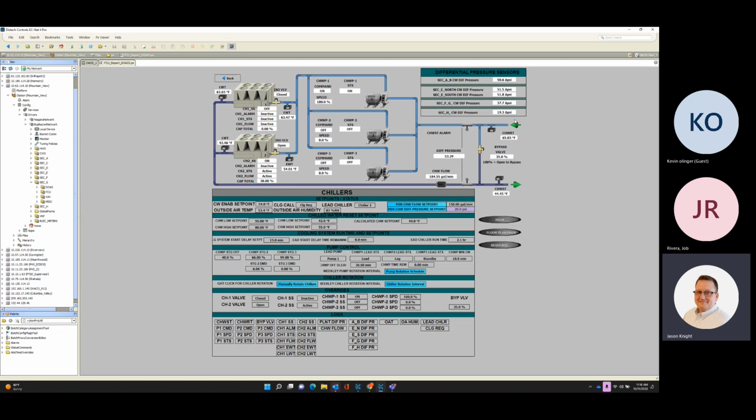So with that being said, we still have a lot going on. Commissioning has already started, and they're going through a bunch of stuff. And then they're asking for things that we weren't asked to do in the project scope. So we're trying to get aligned with SCC and then the project engineer and try to customize the stuff for what they're asking for. So there's a lot of stuff still in progress.